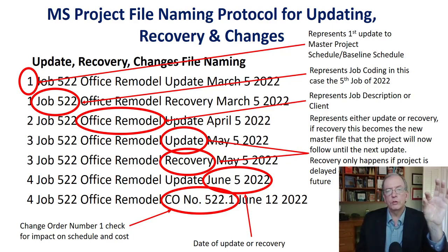And then you could have a folder that's created for this particular project, and all of them would be held in there. So it'd be very easy if you needed to go back, look at something, there's a claim, there's a delay or some issue with something, you could go back and you could see the contemporaneous schedule, the as-built schedule for what happened or what the thoughts were on that project at that time.